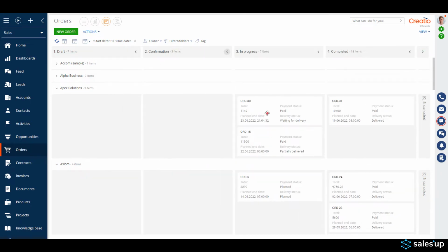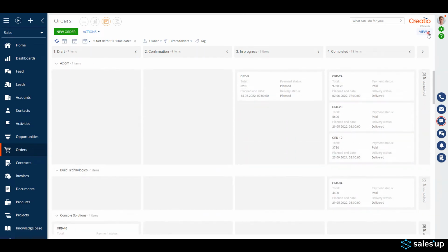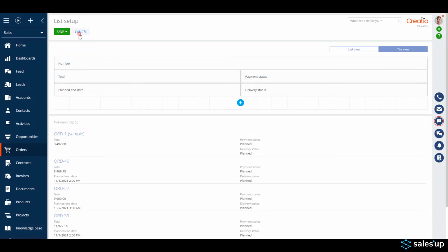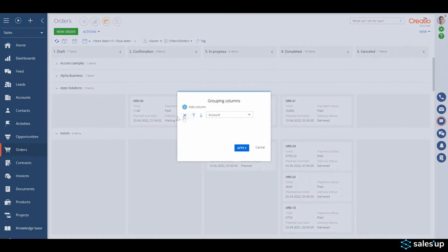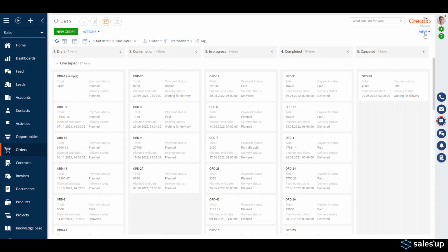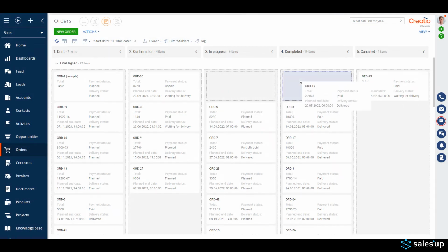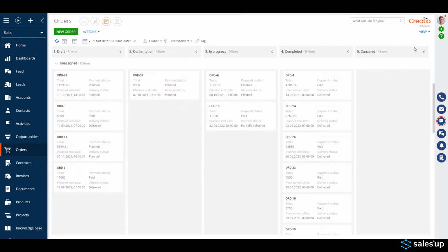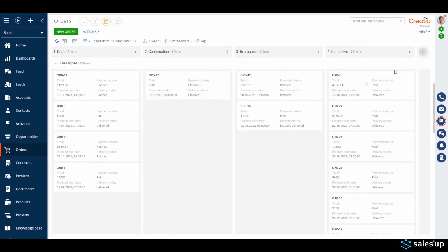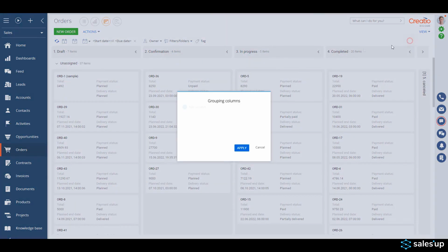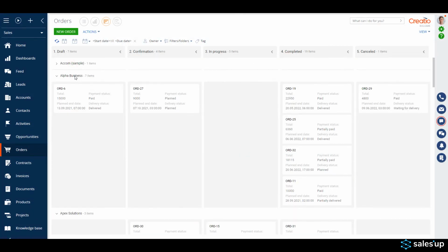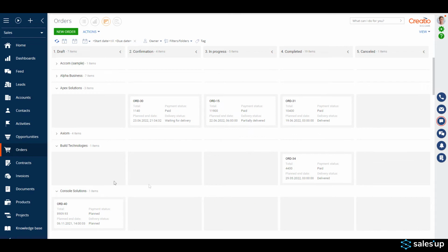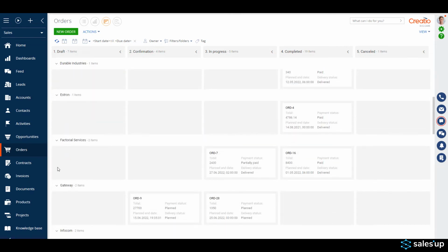While working with the board, it is possible to customize the format for displaying fields on the card, columns for grouping records, and other parameters. You can change statuses from the board interface by simply dragging a card to the corresponding status. At the same time, the system takes into account possible transitions if cases are set up for the section, like from one status it may be possible to transfer a record not to any, but only to some specific statuses. Moreover, a user has the ability to personalize custom line, highlighting with colors, which increases efficiency and convenience when working with the Kanban board.